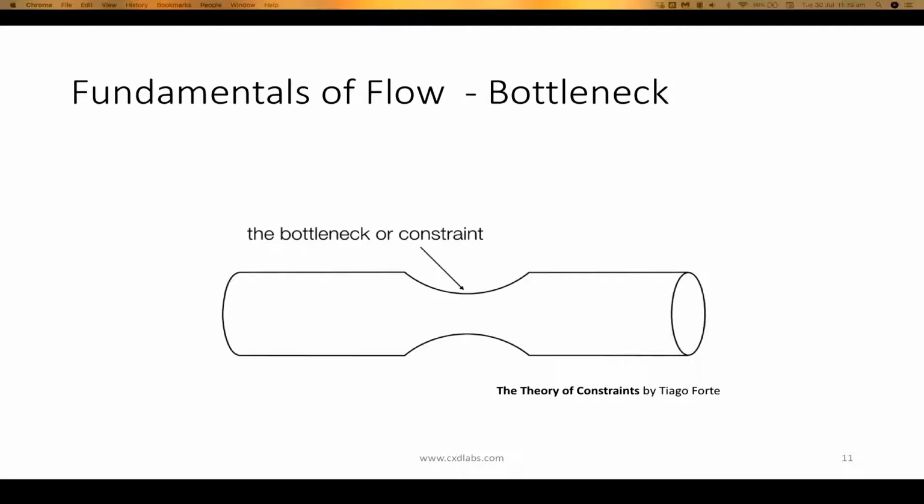In manufacturing, it's very simple to see where a bottleneck is. On the floor, you'll have all these different machines, and the work in progress, the inventory, or the parts will start piling up in front of a machine, and you'll know that there's a bottleneck. But in software and in other knowledge-based work, the bottleneck, the work in progress, isn't as obvious.